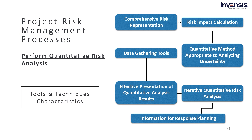The next characteristic is quantitative risk analysis — the success of the process is improved if used regularly throughout the project. It is quite impossible to know all of the risks that may occur in a project beforehand. Therefore, quantitative risk analysis should often be repeated as the project proceeds. The last characteristic is information for response planning. The project contingency reserve should be reflected in the project's schedule and budget, and this is where quantitative risk analysis comes to the rescue — it provides information that may be used to modify the project plan.